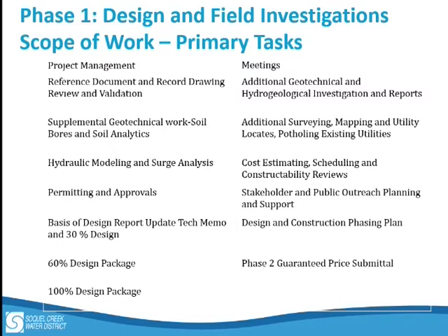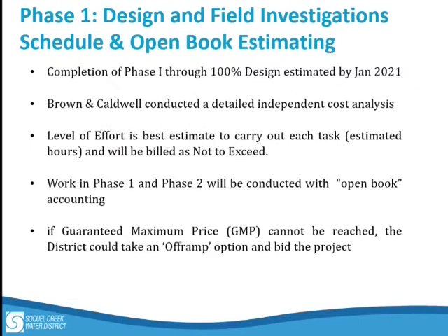We're going to have public outreach, and we're going to have a website and a phone line in case people are asking questions, so they have a way to contact the team. And then of course there's a 30% design, a 60% design, leading up through a price that we'll be bringing back to the board. And then there's a 100% design package that we also have in the scope of work. So what you're approving or considering tonight would get us through about January.